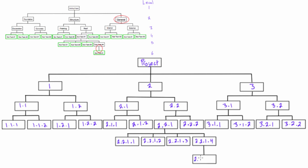And there you go. Now if you were given a work breakdown structure, for example this one from the last video, someone could ask you what is the PMI number for this element or for any given element. And using this method, you can simply label any element with its PMI number.